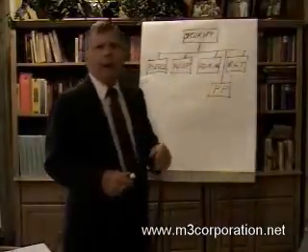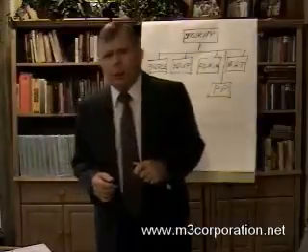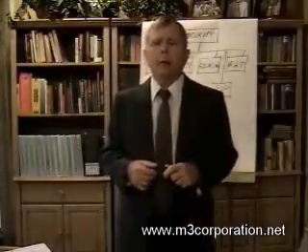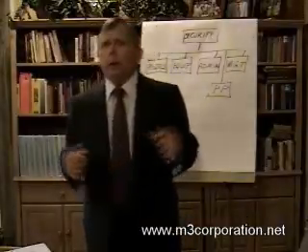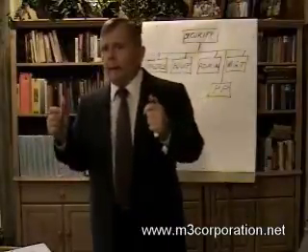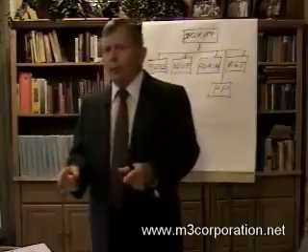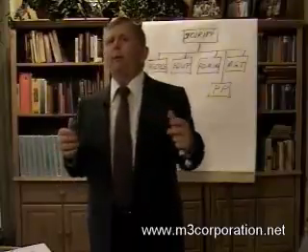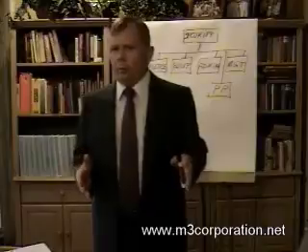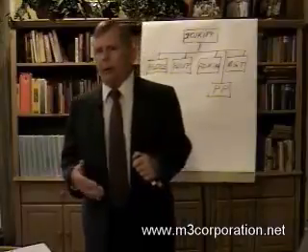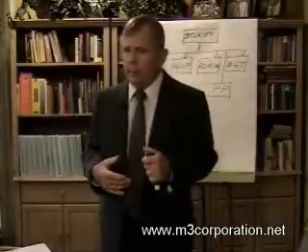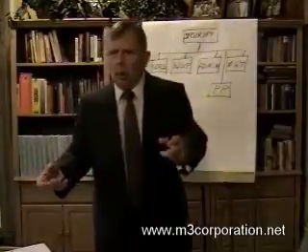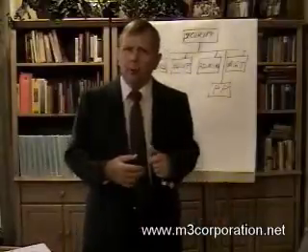These evaluation factors are identified in the solicitation that the government sends out to a contractor. The government is required to identify the proposal evaluation factors and the relative importance of each one of these proposal evaluation factors so that the contractor, when they are submitting their proposal, will tell us how they're going to do the job.